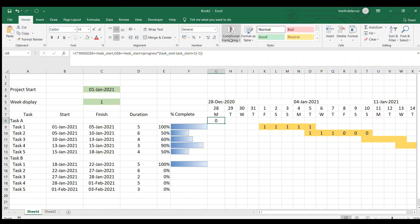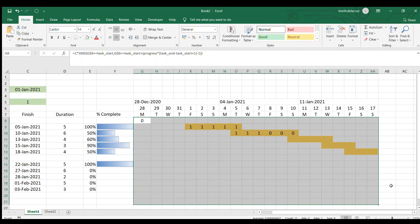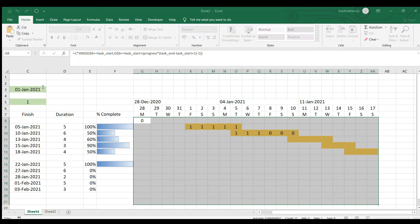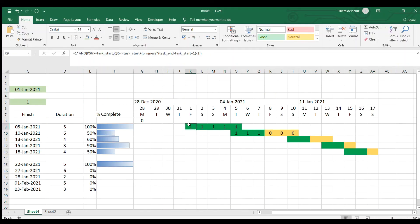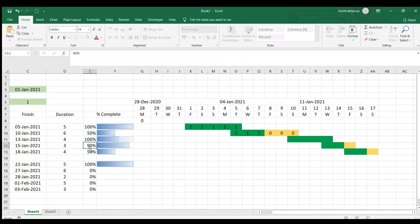I copy the formula, then highlight the cells in your chart. Go to Conditional Formatting, New Rule, Use a Formula, paste the formula there, choose the Format button, the Fill tab, and choose the dark green color. All the cells with an answer of 1 will be filled with green. For example, this task at 100% is all green, and at 50% it fills halfway. All of these are now working.